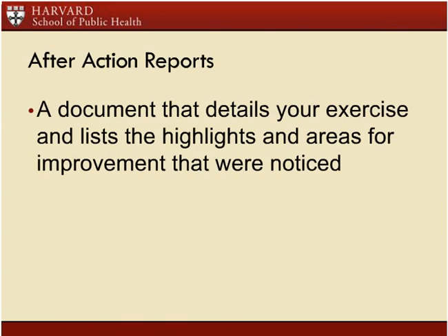The after action report, again, provides a summary of the exercise itself. When was it held? How many people were there? Some of the basic logistical issues. But more importantly, it describes the participants' experience in trying to achieve the objectives, in trying to demonstrate the capabilities that were to be tested during the exercise. So a well-written after-action report really details the experience, names the challenges that were observed, names best practices that were observed. It's not purely a critical document, but it's meant to be one that shares both the best practices and the common challenges, and tries to highlight areas that need to be improved.